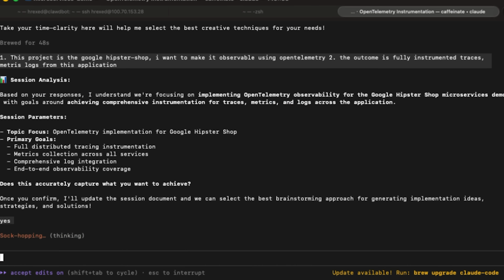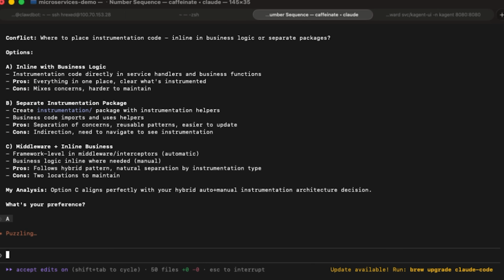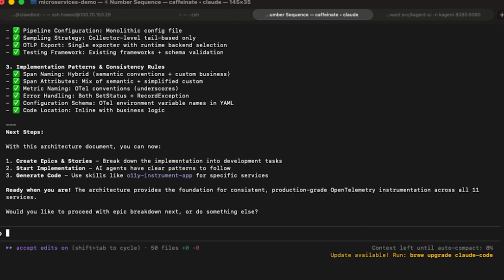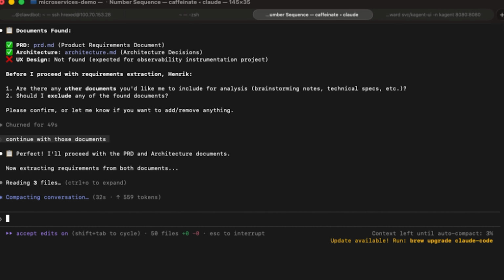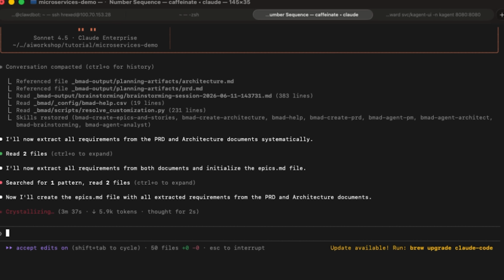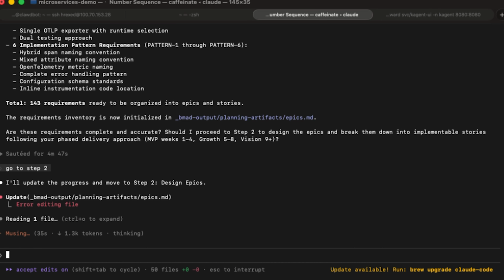Bob does the research and generates epics and stories. Each story has acceptance criteria. Each one is sized. John picks up. He frames the why. Why does observability matter for this app? Who is the user? What does success look like? Why are we doing this?